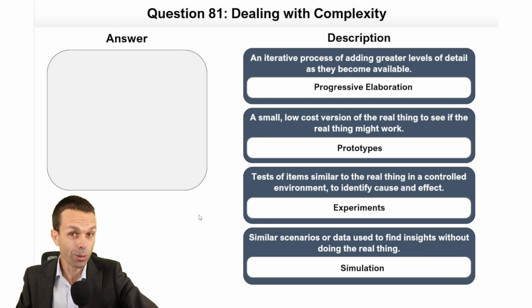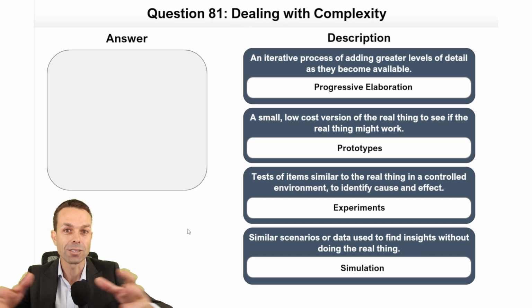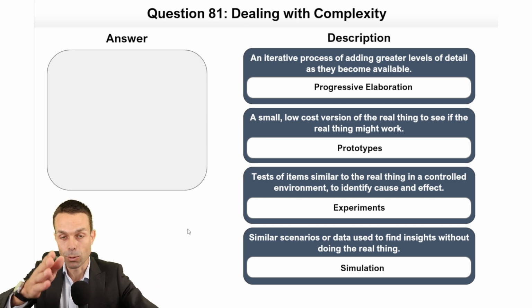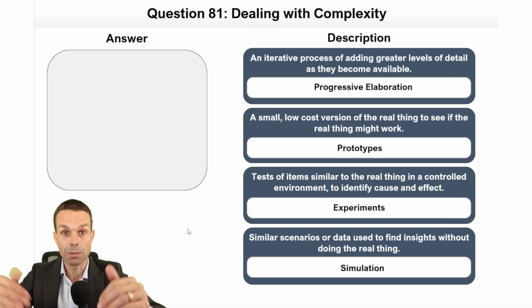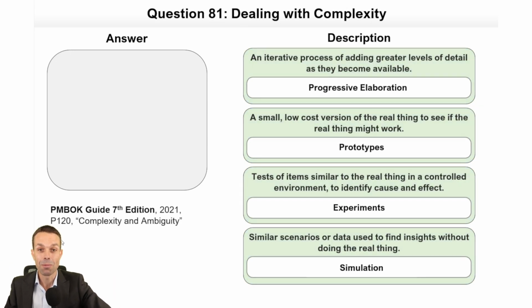And Monte Carlo simulation is something you'll find in quantitative data, especially for our risk, where we do 1,000 different runs or tens of thousands of different runs of the same scenario, but with different variables for each of the inputs. Anyway, data is one of my favorite things, if you can't tell.